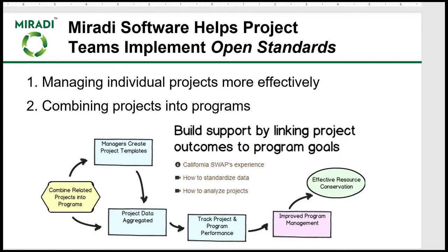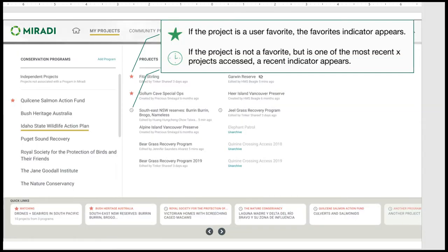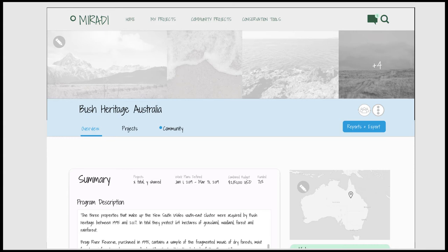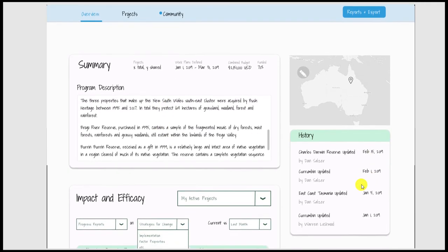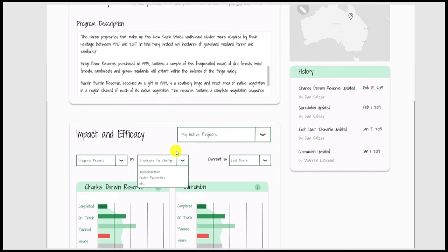So far we've been looking at the project view in the new Miradi Share. New program views and improved program management changes are coming as well. Miradi Share is designed to manage related projects within programs where the project data is aggregated together to track project and program performance. The new Miradi Share will have better capabilities to browse among different programs. Users will be able to flag their favorite projects, which appear at the top, followed by projects that the user has edited or viewed more recently, and place projects in a quick links panel at the bottom. There will also be a new program landing page — here's a wireframe for Bush Heritage Australia — where you'll be able to display a slideshow, and a program summary showing number of projects, number shared, work plans, defined date range, combined budget, and percent funded. There will be an overall program description, history of recently edited projects, and program performance graphs to assess overall progress.